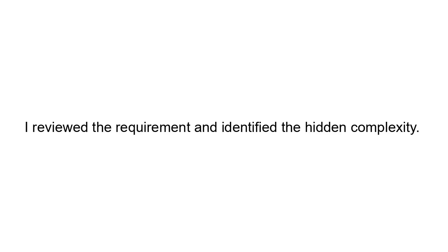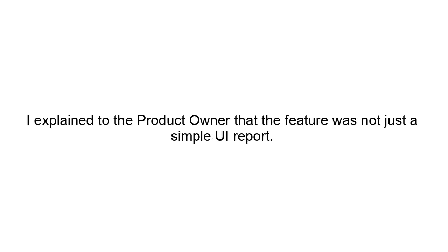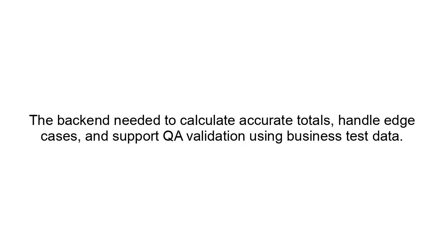Action. I reviewed the requirement and identified the hidden complexity. The complexity included calculation rules, date range behavior, time zone handling, large data volume, export logic, user role restrictions, QA test data requirements, report accuracy validation. I explained to the product owner that the feature was not just a simple UI report. The backend needed to calculate accurate totals, handle edge cases, and support QA validation using business test data.